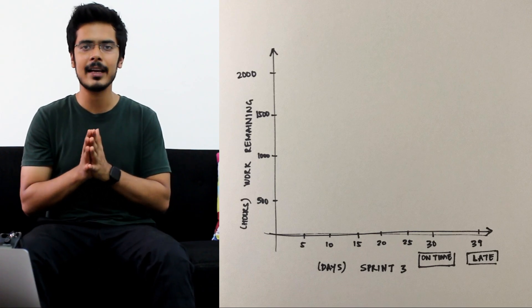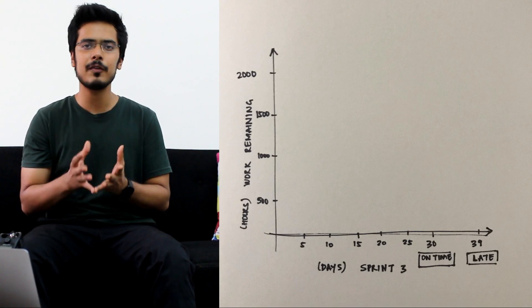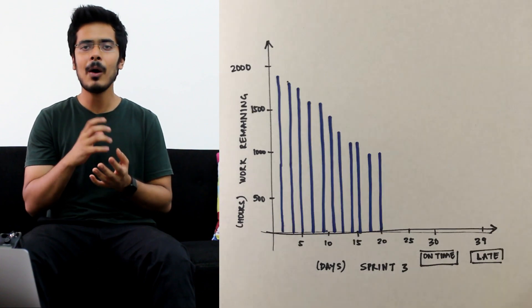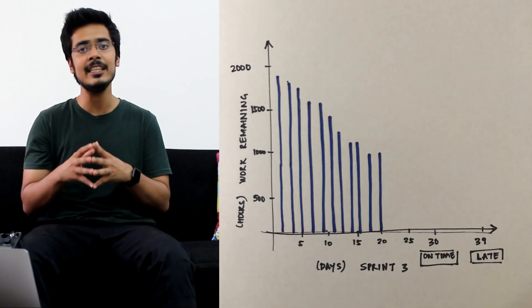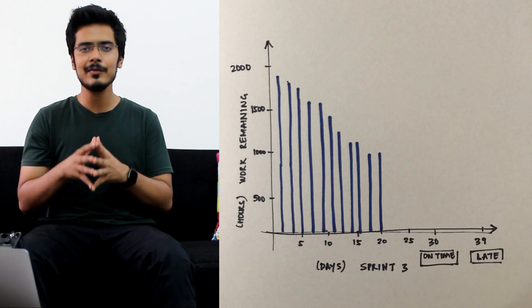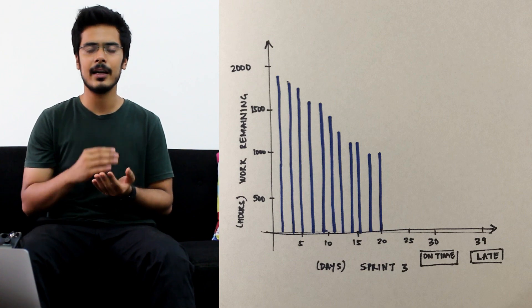Now as the days progress, every member in the team working on any of the user stories uses any software to start logging the amount of work remaining for their user story to complete at the end of each day. Now at the end of the day when all the developers have basically logged their work, you get to know the amount of work done.